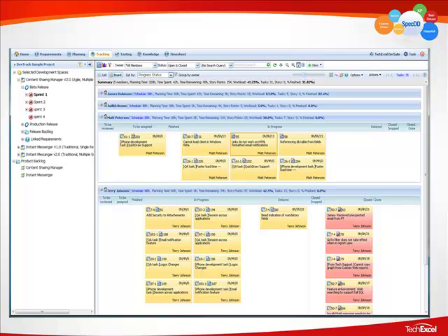You'll notice that none of the QA subtasks are listed here. And again, the time remaining for those QA subtasks are not included in these tasks. They're not included in the calculations for the time remaining. They are not included in the burn down report.